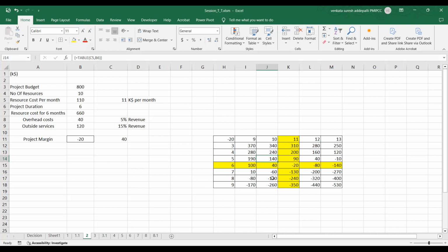Our margin should be some number, and you can choose, hey, if I want to be within 100K or 140K, this seems to be a scenario wherein I have to be within 10K per month and I have to do it within 5 months. Then I will be around my target. So this gives you a whole picture. Even when you are presenting a scenario, anything that's uncertain, you can never really present an absolute number. You have to present a sensitivity study with a range. If a couple of major parameters are varying in this manner, this is what would happen, is what we should project to our leadership team.